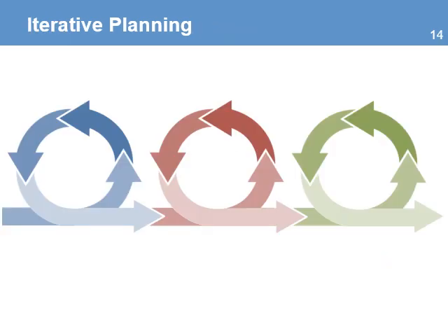That is the idea. It is an iterative planning cycle that happens many times during the life of the project, and you don't need to wait until the end of the project to adapt or modify or make improvements. You can do it every 3 months, every 6 months, depending on the length and complexity of your project. The idea is that planning is more important than a plan. It is a continuous process of planning through the life of the project. The closer you get to the end of the project, the less you're going to need to make changes and updates. But the early stages is when it is needed the most, because you don't know much about what's going to happen in the project, so there is a need to be flexible in your planning approach.